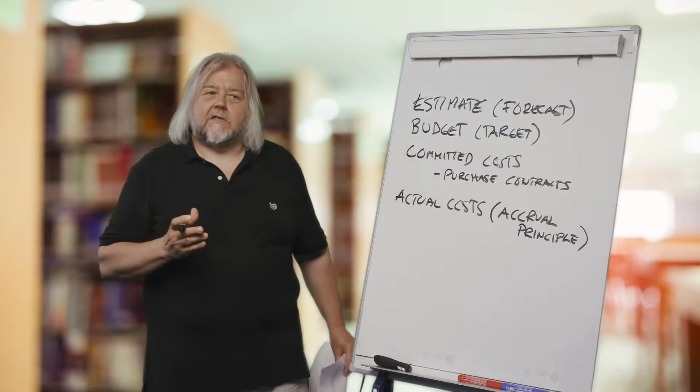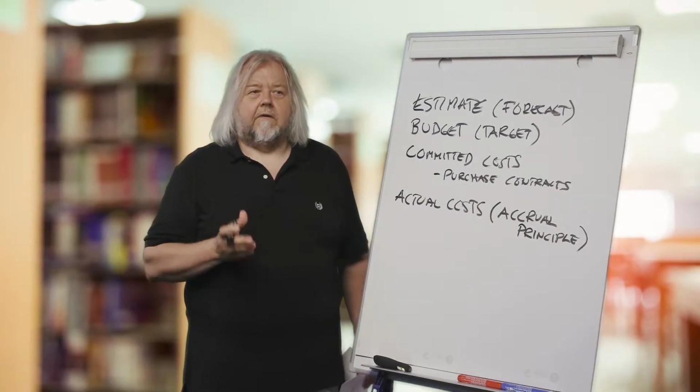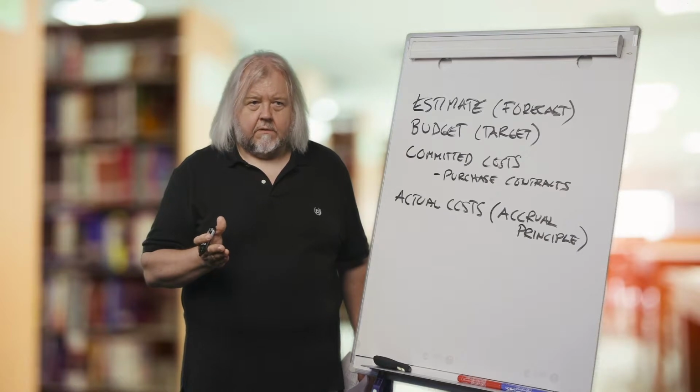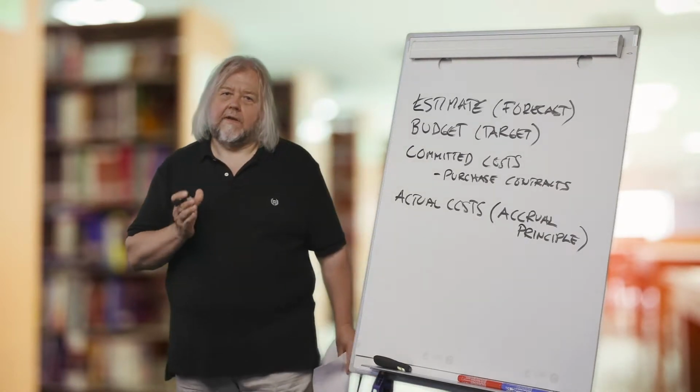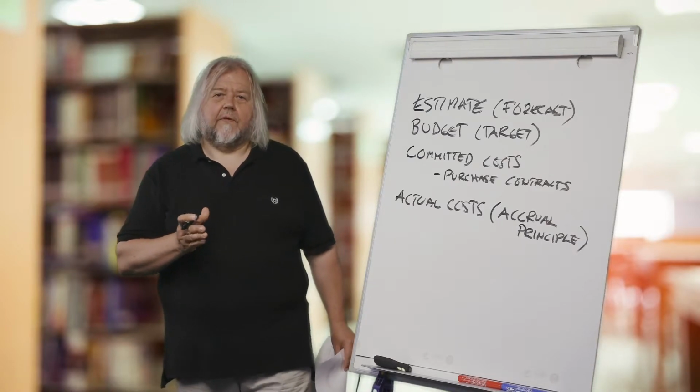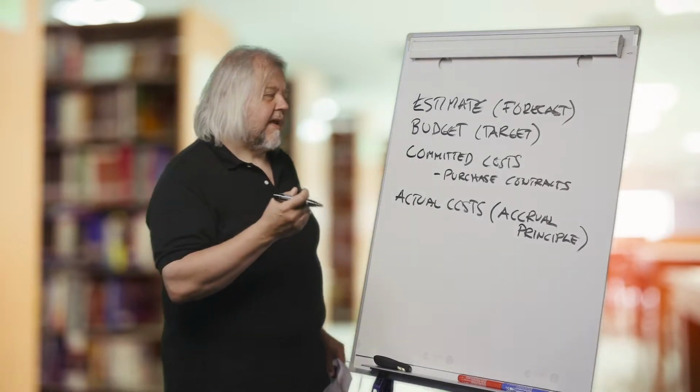And this means that actual costs are real process-based. So costs incur when the actual real delivery of the product or service has taken place.